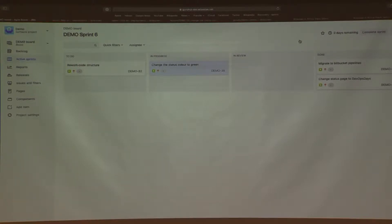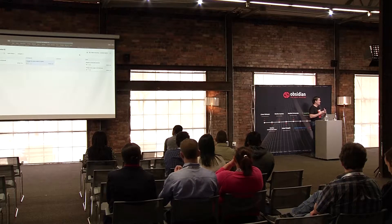There's a really nice time-saving thing here. I don't have to remember as a developer to move my issues into in-progress. Simply by creating the branch and telling my JIRA workflow that the trigger for moving it to in-progress is that I create a branch in Bitbucket, I rely on Atlassian to do the heavy lifting. Atlassian is really strong in that integration between different products — making sure that from a user point of view, we do the least amount of work and gain the most benefit from the tool.